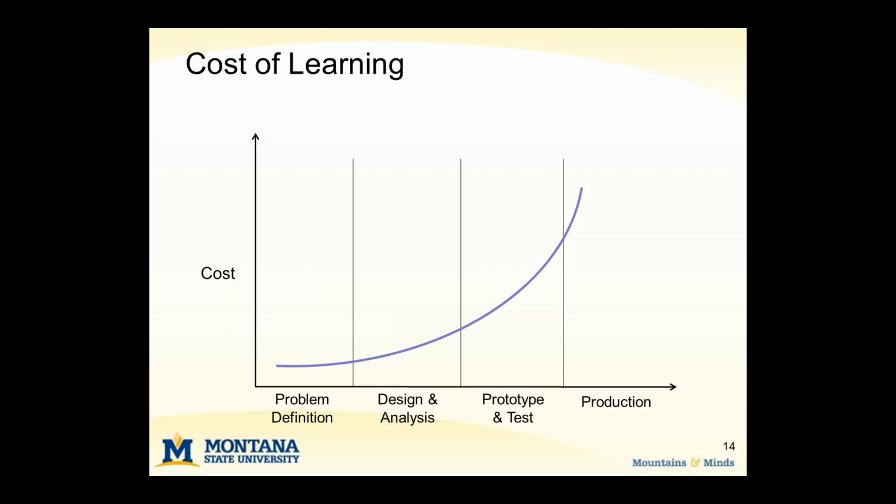Then as we get into developing CAD models and 3D solid models, we start adding detail to those ideas, and making a change is a little bit more expensive than with just the sketches. And then certainly as we get into prototyping, particularly some of the more high fidelity prototypes that we would do life cycle testing on, for example, those can get quite expensive. And the most expensive of all would be trying to look at a new idea when we're already in production, such as trying to deal with a production issue, yield issue, or warranty problem.